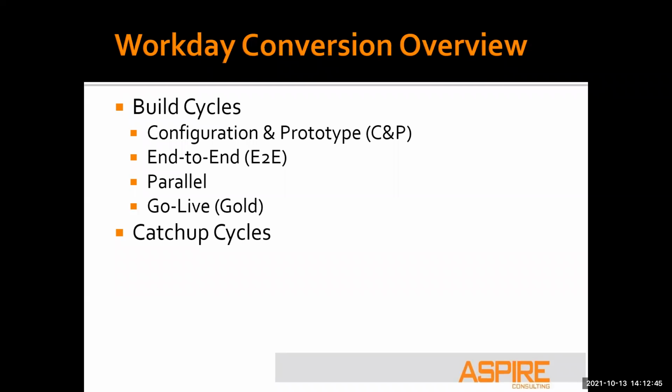So you may do an extract and a load cycle to get your initial set of data into your Workday tenant, and then come back 2 weeks later, before, let's say, a blackout period where you absolutely shut off new hires and any kind of benefit transactions. Don't get hung up on the 2 weeks. It could be 5 days. You may not have it at all.